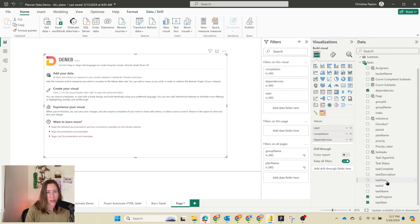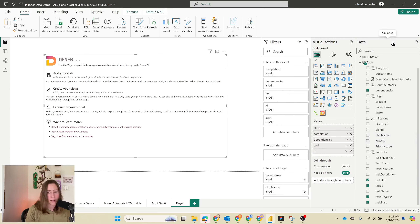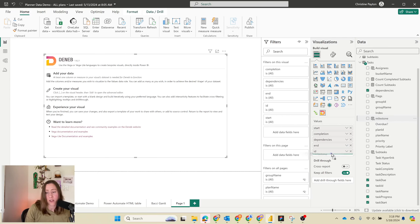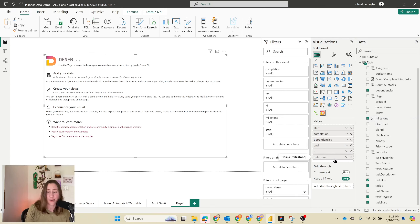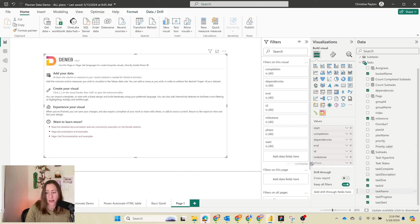Then we have end. I'm going to use the task due date, not the task completed date, because the task completed date is only going to be filled out for completed tasks, and we need all of our tasks to have a start and an end date. So we're going to do task due and rename that to 'end'. Then we need a task ID — that's the ID field. Next up is milestone — non-premium planner does not have milestones. This is a true/false column. I added one here just for fun by joining in a table of true/false values to my task IDs. Then next up is phase — I'm using the bucket, the planner bucket name. If you're working with a data set that has planner data from multiple plans, you could use the plan name here, or whatever you want to group by, it goes in here — call it 'phase'. Last is the task name, and that just needs to be called 'task'.